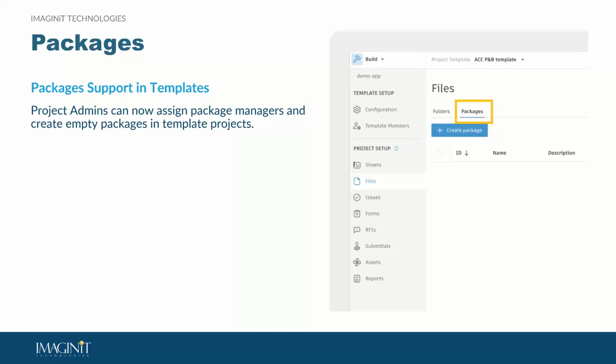But we can now add packages to it, and we want to make sure that we've got the rest of our template configured, whether it's members or workflows, reporting, all of the various things that you can utilize in your project. On every single project, if it's going to be used, it needs to be in the template.